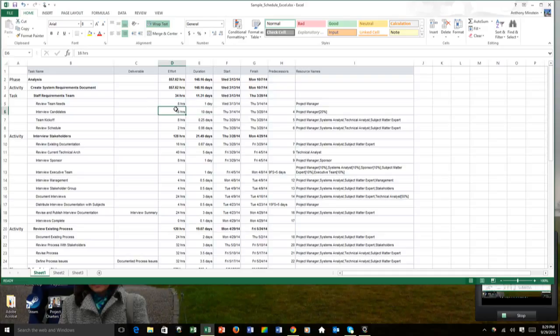Well, why can't I do those 16 hours in 2 days? Well, it may not be feasible. Here I'm interviewing candidates to staff a team, and I may not be able to schedule back-to-back interviews. I may not be able to adequately interview a person if all I'm doing is interviewing a person and another person and another person.